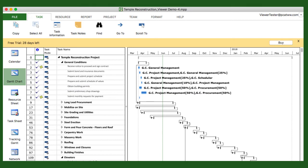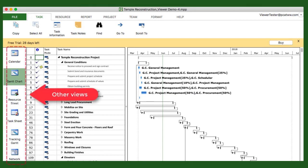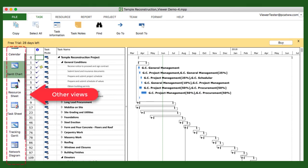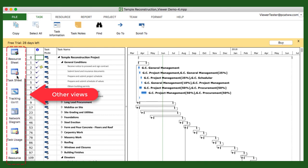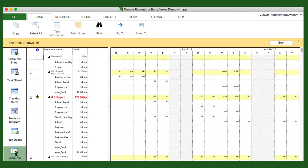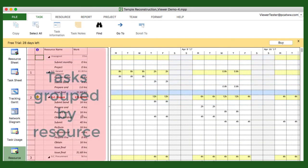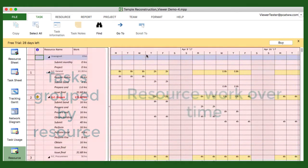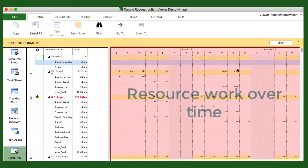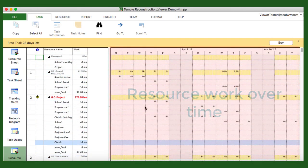Many other views are aligned on the left-hand side of the screen for you to explore. For example, tap Resource Usage View to see how resources are used in the plan. Here all the tasks assigned to each resource is displayed, along with a timeline showing when that resource is used.